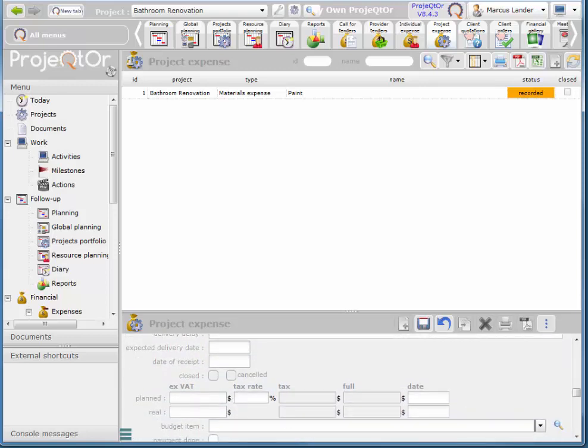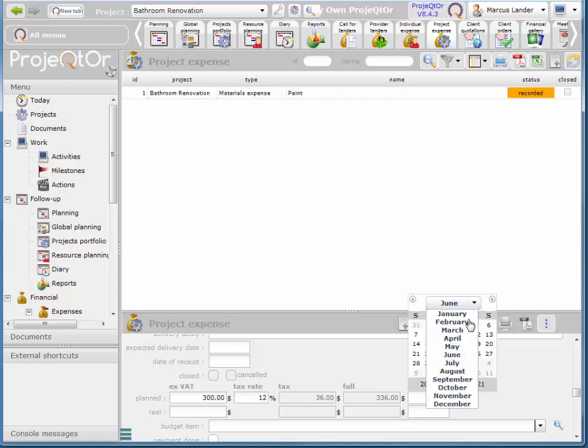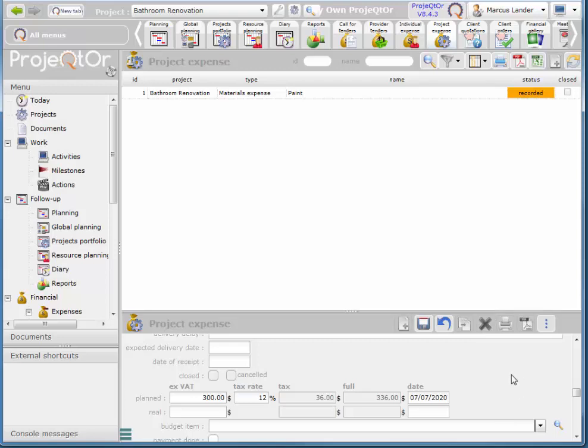And then we think that's going to cost about $300. And 12% tax, and the date somewhere in July. I'll say we're going to buy just before we start on that task. So maybe just at the beginning of the project. And save.